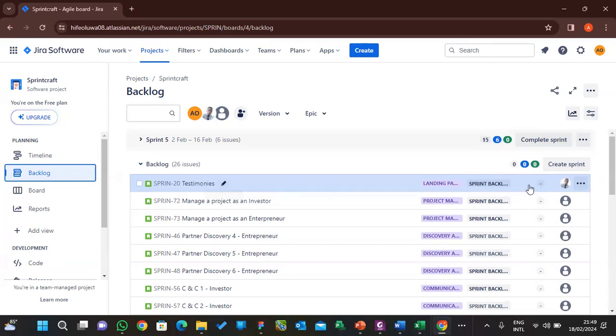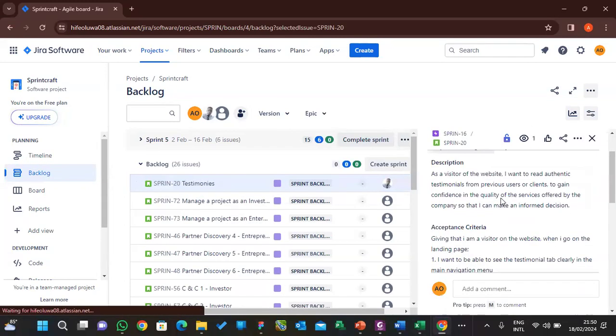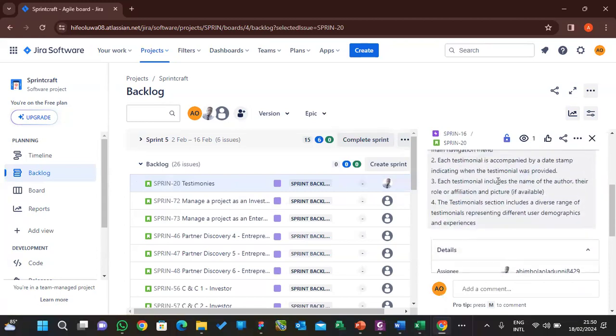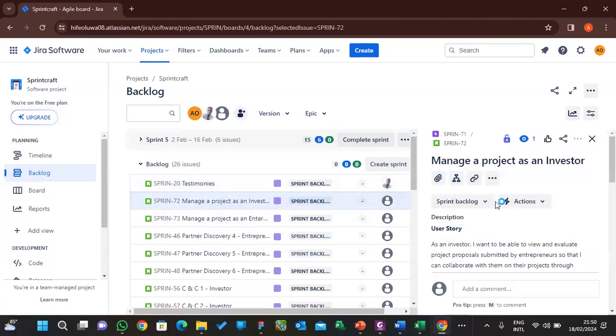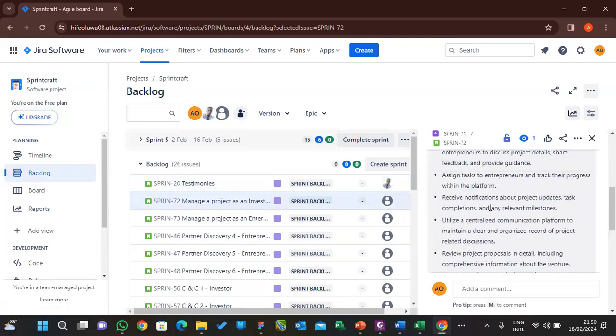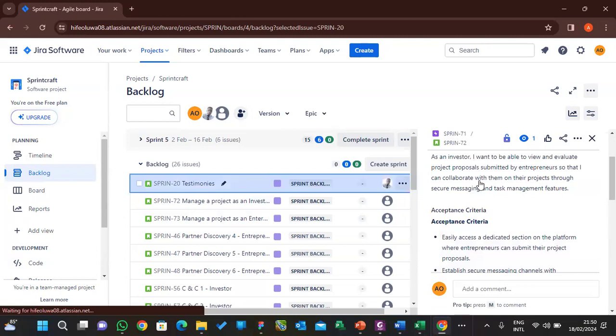Now, for this user story, the developers are going to use story points, go to Fibonacci planning poker to do a relative estimate. So developers will go to planning poker and do the relative estimates. For each user story, they are going to consider things like the risk to deliver it and the workload involved, right? There are so many steps. Like now, this one has 4 acceptance criteria. This one may have more than 4 acceptance criteria. You cannot expect this user story to have the same story points as this one, right?